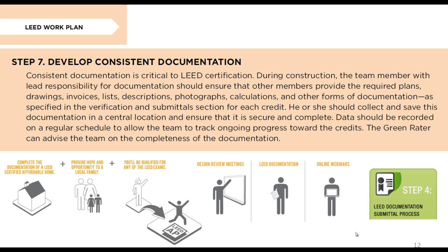Step 7. Develop consistent documentation. Consistent documentation is critical to LEED certification. During construction, the team member with LEED responsibility for documentation should ensure that other members provide the required plans, drawings, invoices, lists, descriptions, photographs, calculations, and other forms of documentation, as specified in the verification and submittal section for each credit.